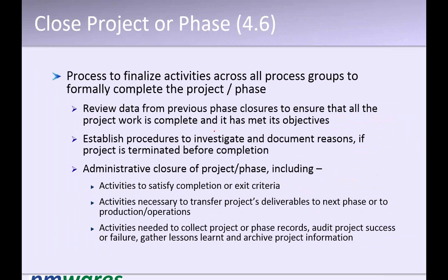Closing the project or phase is the last thing, which normally happens either at the end of the phase or at the end of the project. What is the idea? If the closure of the phase is happening, that means, as we discussed yesterday, we need to check if the exit criteria is met. If the exit criteria is met, we can verify the deliverables, transition those deliverables to the next phase, document the lessons learned and close the phase.